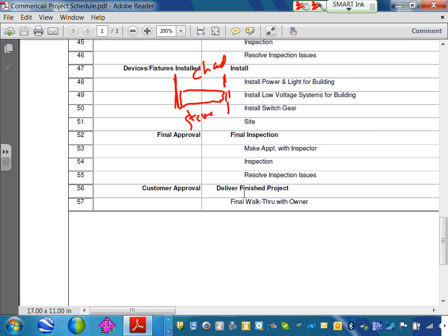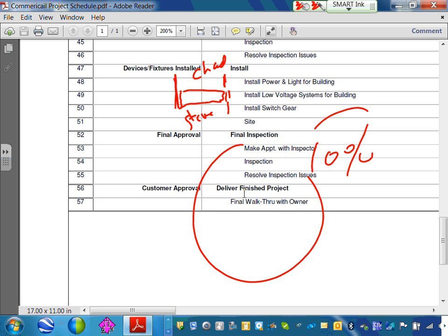This schedule, John, will fit into an overall construction schedule for the whole building. And overall, remember, we're just a discipline. We're mechanical and structural and masonry, and all these guys have schedules, and their schedule will fit into the construction schedule. This is only 10% of the big pie that's called construction. That's us. What happened to the 90%? The general contractor will be in charge of this. So my schedule must fit.